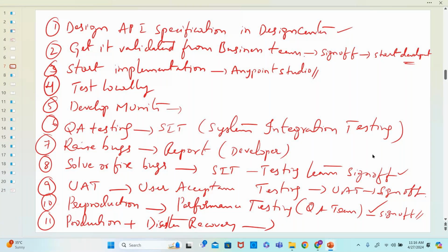There will be a separate board who approves the code for production. Exactly, you need to present them this is the use case and this is the requirement, and we are going to take this to production. And they will ask you whether there are any dependencies, for example DB connector related or SFDC or any other APIs. All those things will be discussed in that particular meeting. Okay, and then they will decide one date, and it will happen.